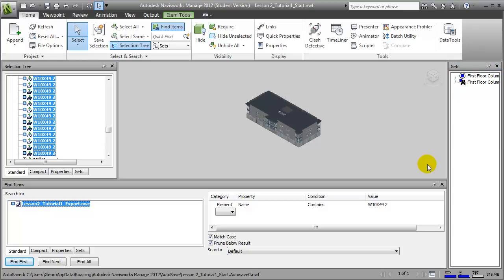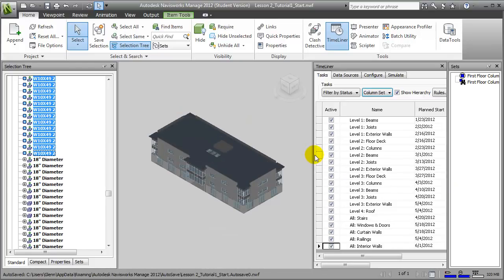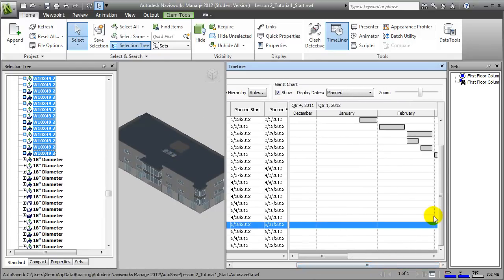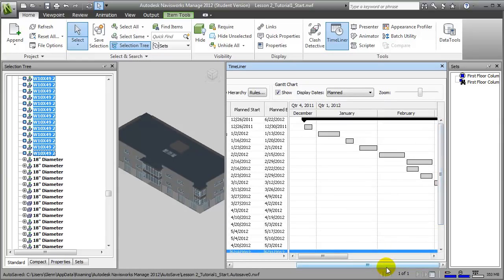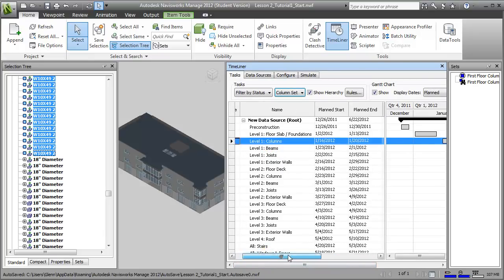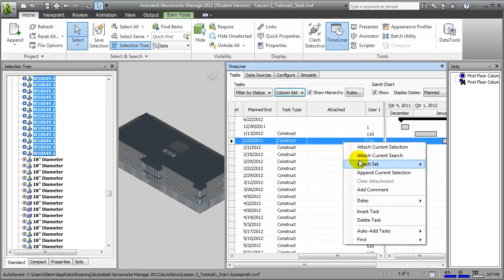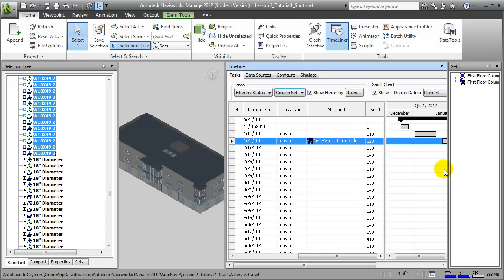Let's open the Timeliner tool again and look at how we attach a set to a task. I'll close the Find Items pane to give ourselves more space and expand the Timeliner pane. If we scroll to the top of the list and find the Level 1 Columns task, we can move over to the Attached column and say Attach a Set to it and choose the First Floor Columns Search. All of the elements associated with that search set are now linked to that construction task.